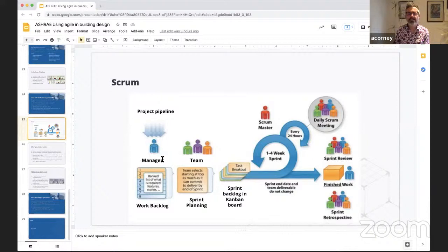In a lot of cases, these structures, like in software, this is my job, the product manager. The product manager is kept a little bit separate from the software developers, in the sense that they're in charge of choosing what the things we're going to do are, and then the development team is in charge of deciding how long it's going to take and how to do it. And that's a really important distinction.